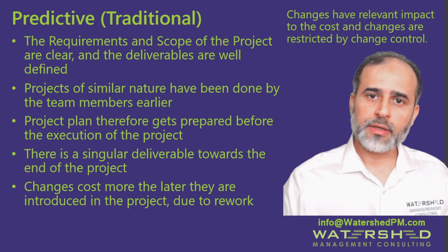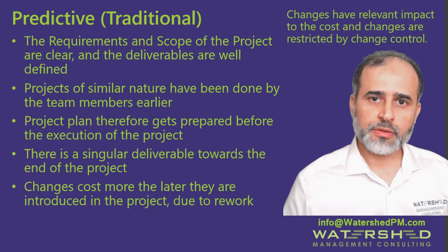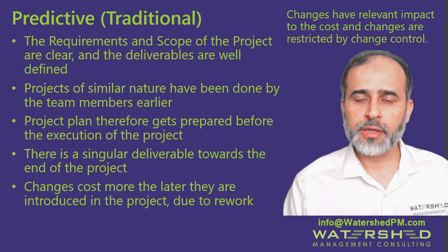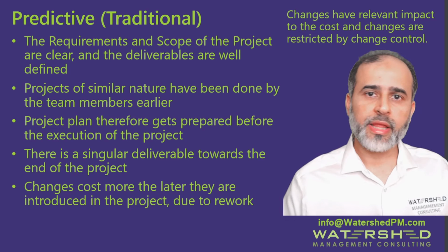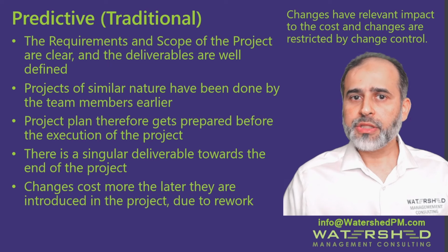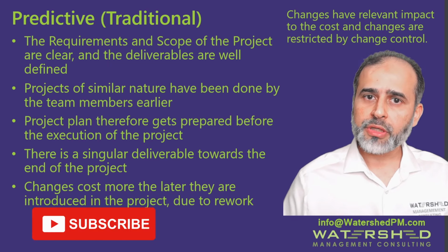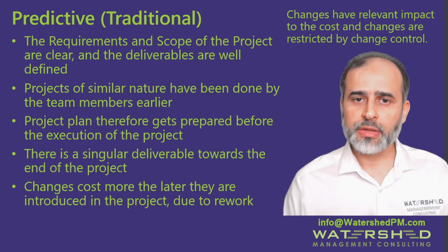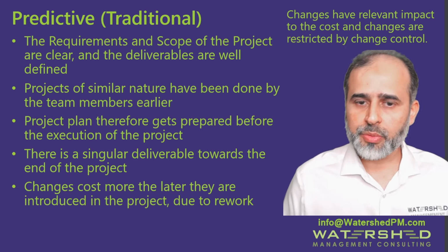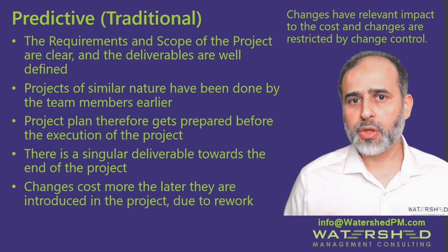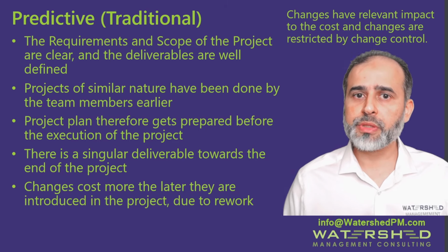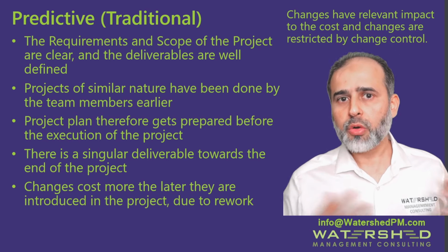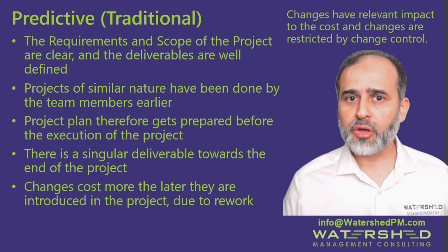While we said that in the other methodology, which is adaptive, change is a constant, changes can also be incorporated in a plan-driven or predictive project, but they come with a cost, meaning that the earlier a change is brought into the project, the more cost-effective it would be to implement. So let's say that there's a change happening to the project. If this change in the requirement or scope is specified very early in the planning, then it will still cost us to make that change, but that'll be the optimal cost.